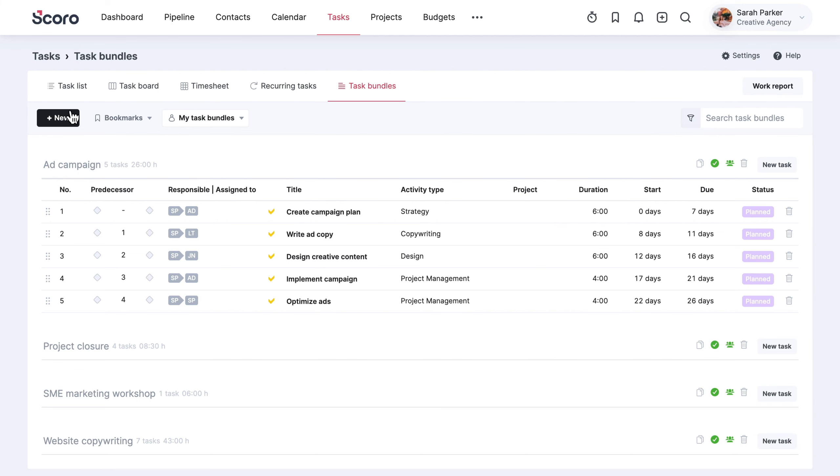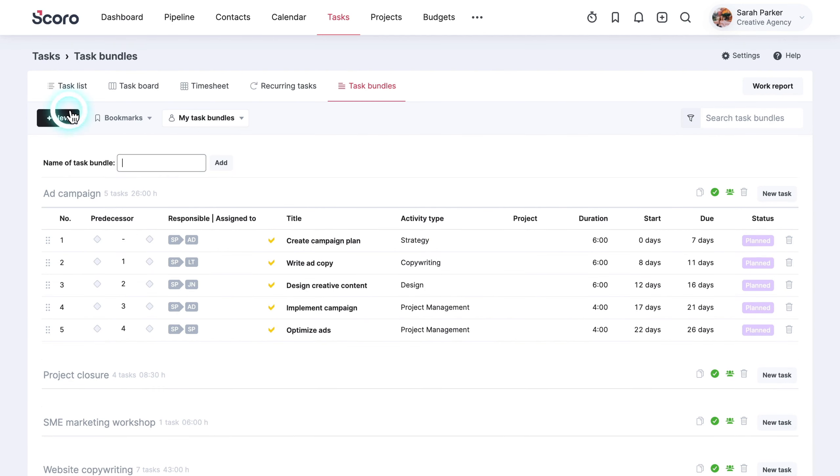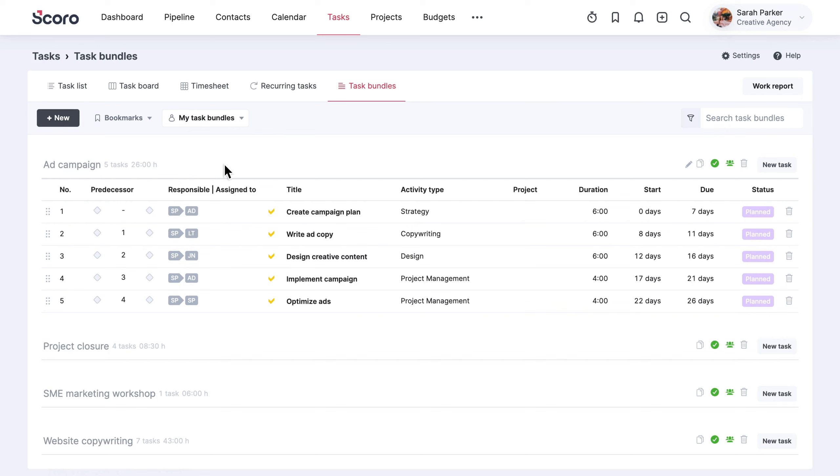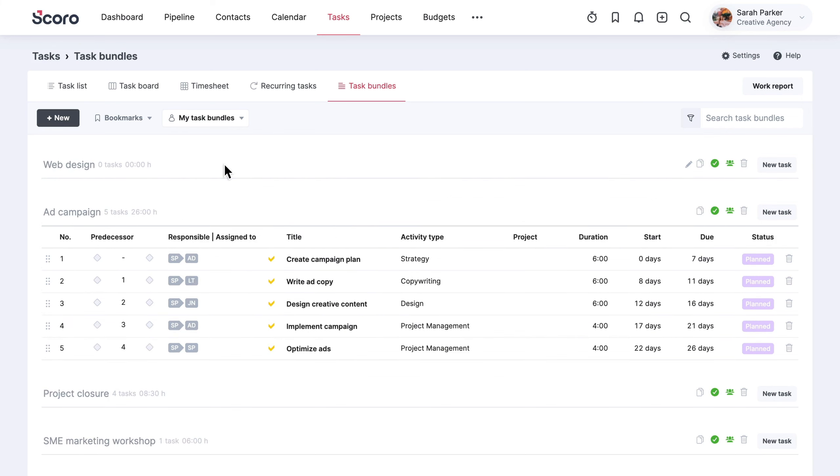To create your own templates, start from naming the bundle, then add relevant tasks under it.